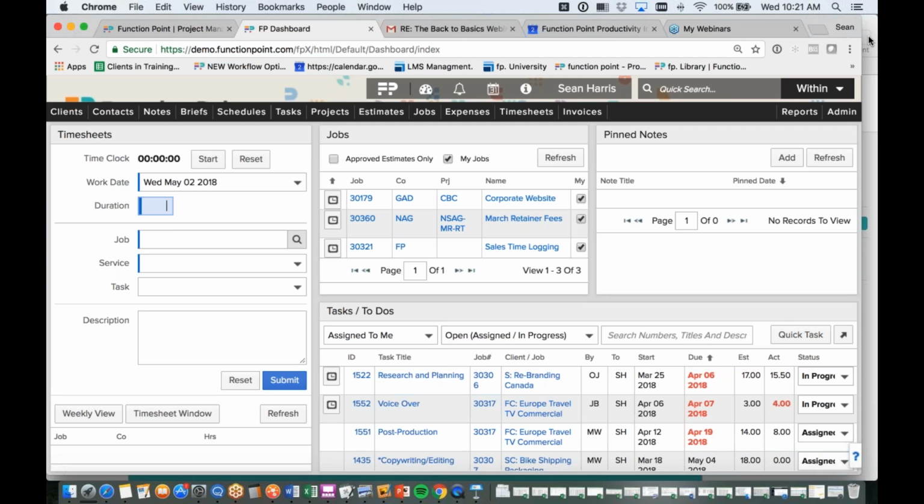What I was saying is that with the industry reports that we've just put out, one thing that really came to light was that there's a lot of agencies out there. I think it's close to 50% that report that they're overservicing their customers. So, they might quote 10 hours to create a piece of collateral. At the end of the day, we end up putting in 20 hours. Now, that's one of those things where obviously if we're overservicing continuously, we're going to start losing money at some point. That's really eating into our profitability.